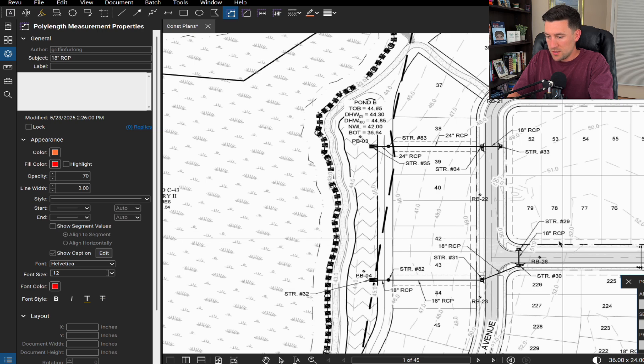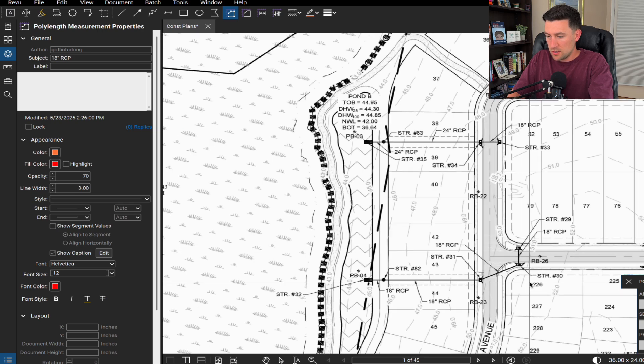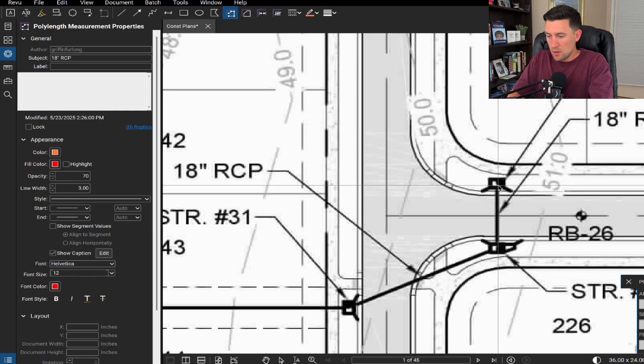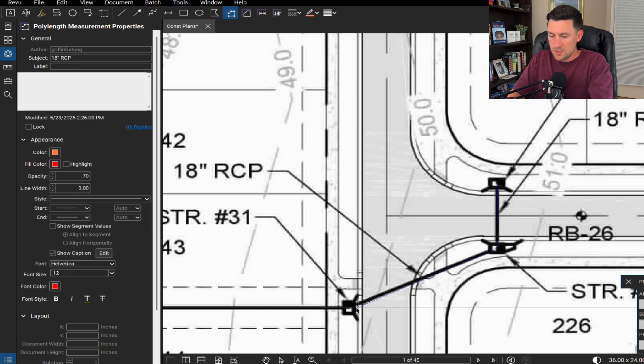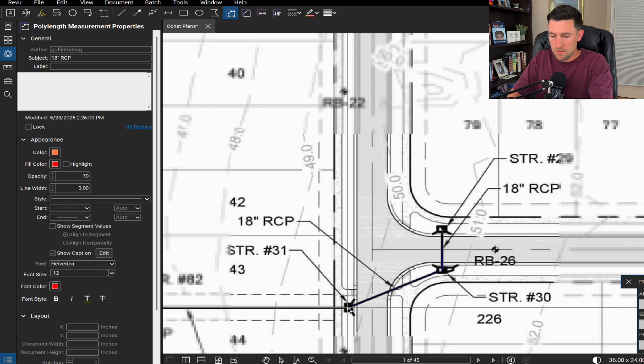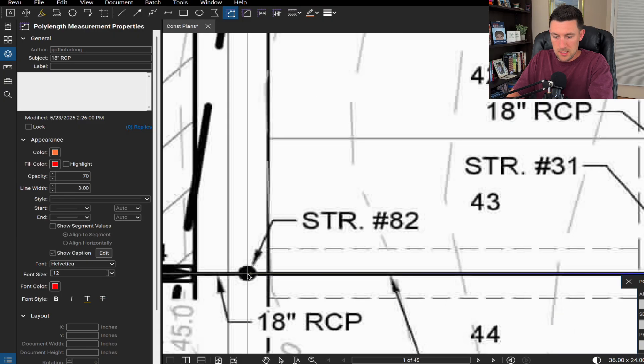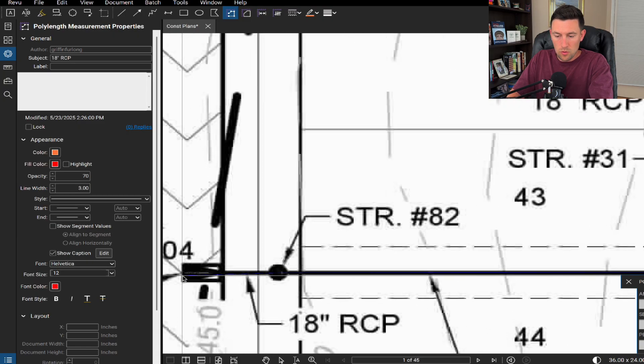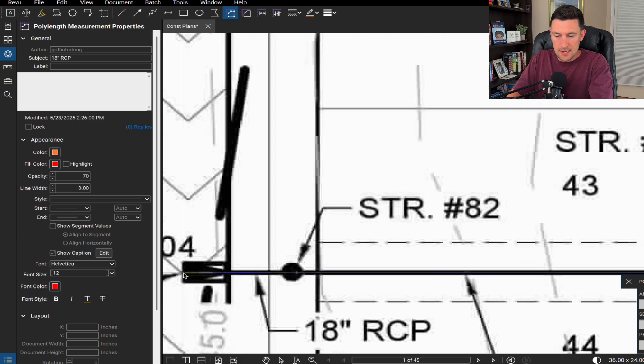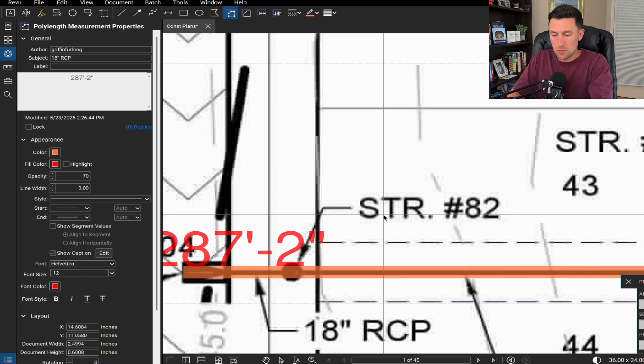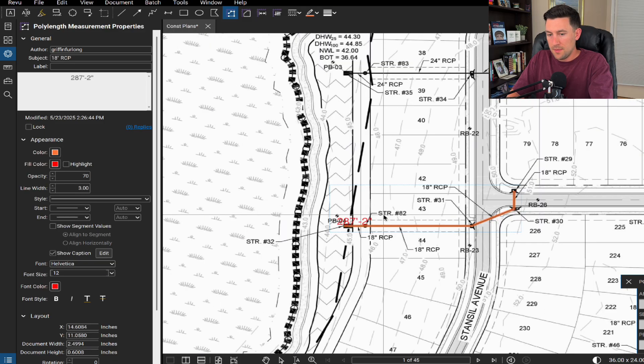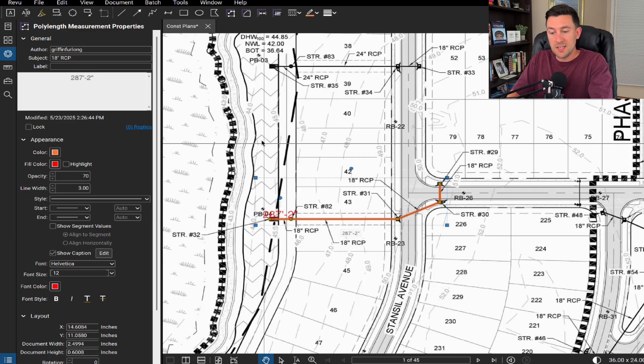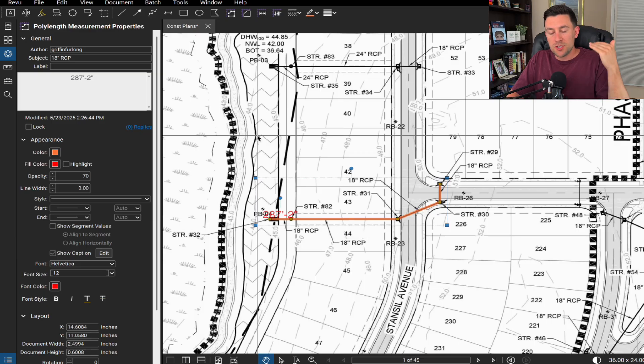So I noticed that there's a stretch of 18 inch RCP here. I typically like to go between the middle of the box along the center right there to the middle. Then we'll go to here and then we'll go all the way to the end of the mitered end. I'll double click and this is what we have. Now I know some of the novice Bluebeam users will go, okay, well that was easy.